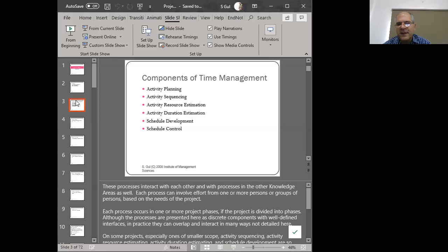Now, once an activity has been planned out, the next step is to see what precedes that activity versus what succeeds it. That is to say, what comes before an activity and what is going to occur after it. The things that precede an activity in the sequence are those whose output, when they come to an end, becomes the input for the activity of your concern. And when the activity of your concern finishes, its output becomes the input for the next succeeding activity. So it is important to think in terms of the sequence that exists amongst these activities as well.